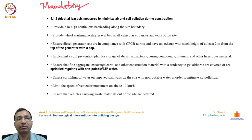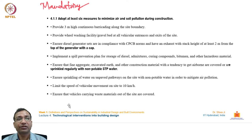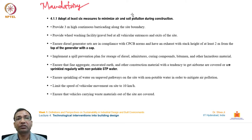Additional mandatory construction management measures include: sprinkling water on unpaved pathways with non-potable water to mitigate air pollution; limiting vehicular speed on site to 10 kmph; and ensuring vehicles carrying waste out of the site are covered. These points address preventing pollution in all its forms — air and soil — during construction.